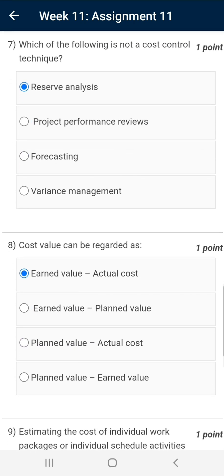Question number seven: which of the following is not a cost control technique? The correct answer is reserve analysis. Reserve analysis is a tool and technique for cost budgeting, not cost control.